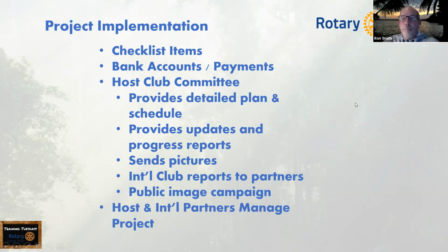Generally, on big projects like ones I've been engaged with, a progress report every quarter works quite well. And they give you some update on the budget. They show you some of the bank accounts. You don't wait until the final report, because if they're going around scraping up all the receipts at the final report, after 18 to 36 months, good luck. So collect them on the way. Okay. And if they need some help managing the project and helping take the barriers down, that works well. Thanks. Next slide.